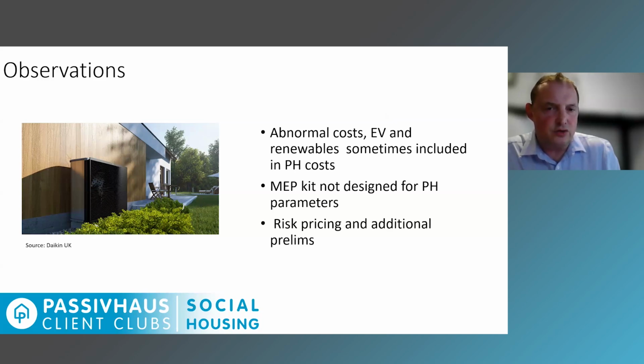So in the Southwest, you'll see risk pricing has reduced for these types of builds compared to where we were 5, 6, 7 years ago, because once your supply chain has understood it, then the risk pricing will be more realistic. Okay, I will pass on.